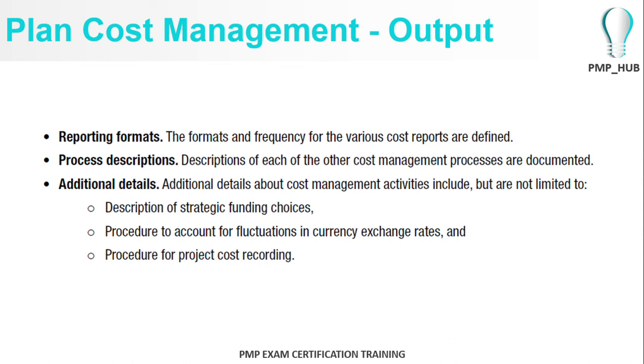And any procedures, you can define any procedures of cost recording. This is how we'll record the cost, and this is how we handle the currency exchange rates that we take. Sometimes there is an exchange rate gain or exchange rate loss. These days it is exchange rate loss. This is how you account for it. So this has to get agreed with your finance team before the project.